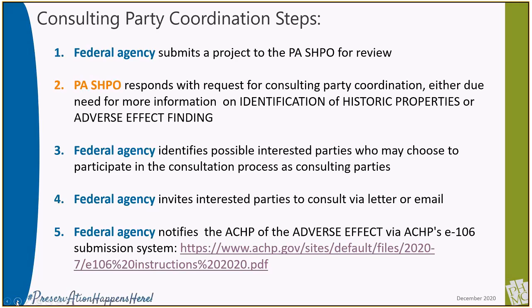just along their route. You should also invite anyone who has a local perspective that's worth hearing in the consultation process. The neighbors who have a concern about how this project would hopefully benefit their property would perhaps enjoy the opportunity to respond either in writing or by participating in the meeting. Neighborhood groups might have a strong opinion about what is proposed for that site. If it's a downtown project, there might be someone who represents the Main Street organization or even the Chamber of Commerce. And as I mentioned, you're looking for people with a historic preservation interest initially, but really anyone who has a legal or economic interest in the project.